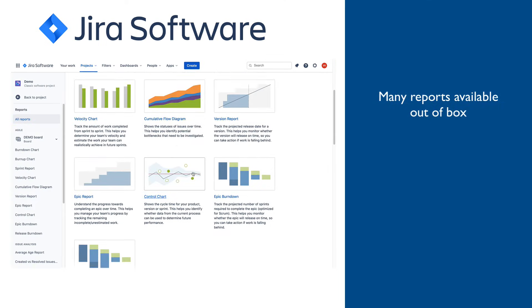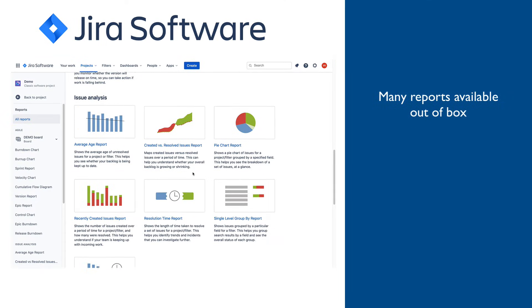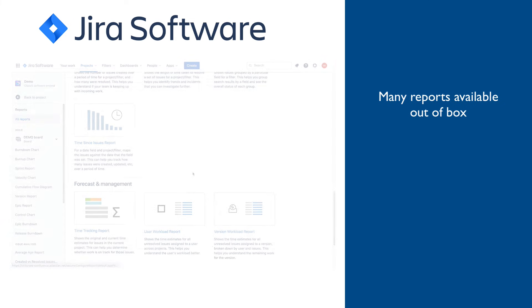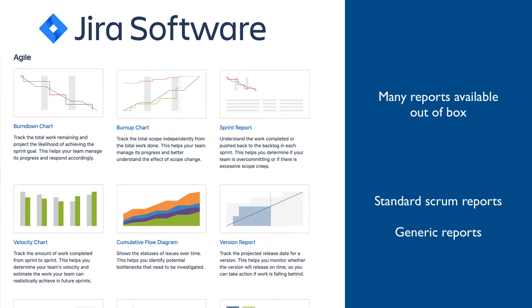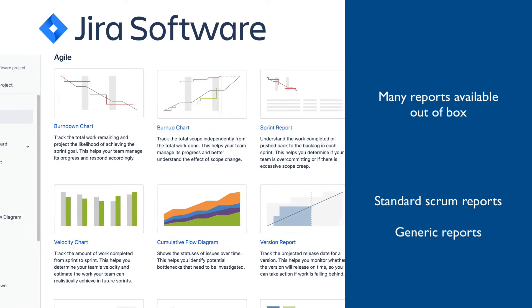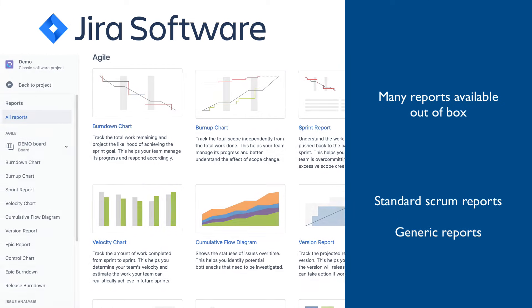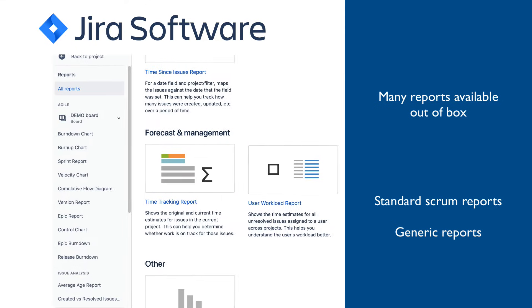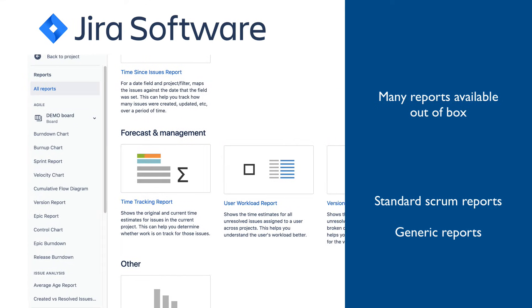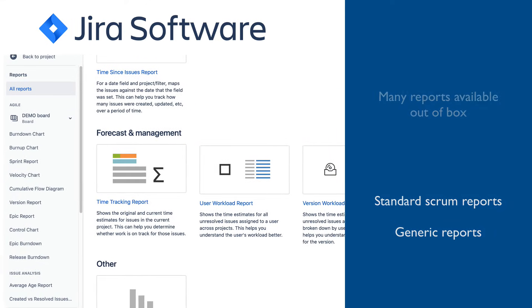Many project reports are available out of the box. A lot of them are related to Scrum concepts, such as velocity, burndown, and burn-up chart for project, release, or sprint, while others are fairly generic, like time tracking or user workload.